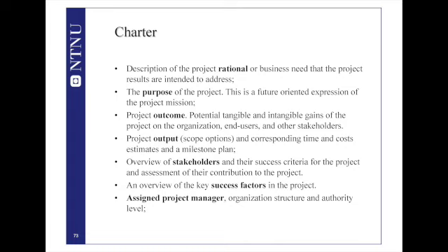You go further and you define the key success factors in your project. How should I manage this project? What are the main good management factors that I have to apply? In simple terms, by the way, the success factors are: how are you going to force the outcome, to force the positive gain, the opportunity, and how you will reduce the negative impact.